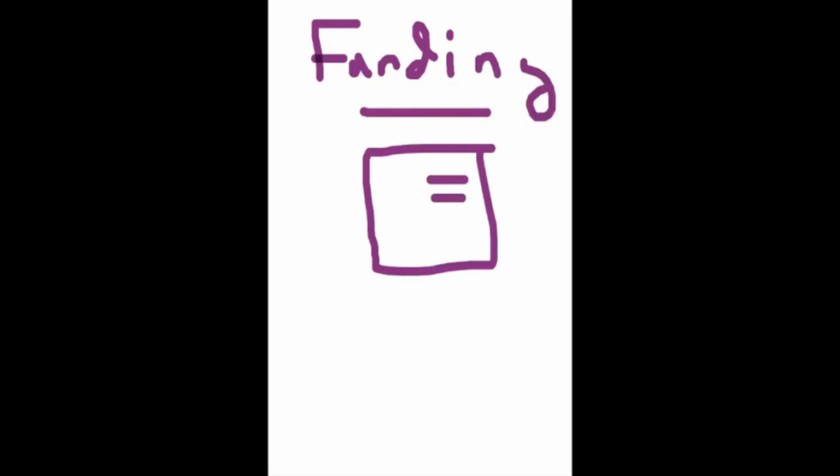Yes, there is, right? You can't just go up to the CFO and say, hey, listen, I heard you're in charge of finance. Can I get that check real quick? No. I work in budgets. I manage budgets. There's a process. Talk to that manager. Talk to that director. Talk to that VP. Oh, okay. We'll give you the money 3 months later. That's the process. That's the protocol. So an organizational process asset is how the company does business, the policies, the procedures. Don't forget this. I'm going to give them to you right now. Policies, procedures, protocols, historical information.